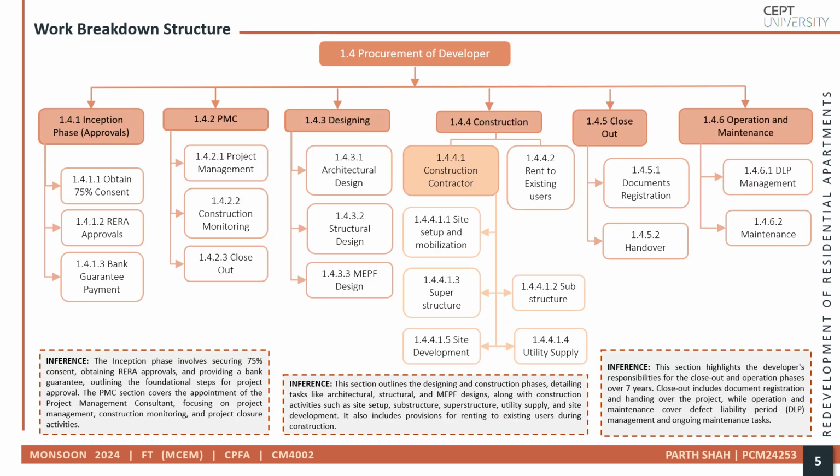The inception phase of the developer involves securing 75% consent, obtaining RERA approvals, and providing a bank guarantee. Outlining the foundational steps for project approval. The PMC section involves the appointment of a project management consultant, focusing on project management, construction monitoring, and project closure activities.